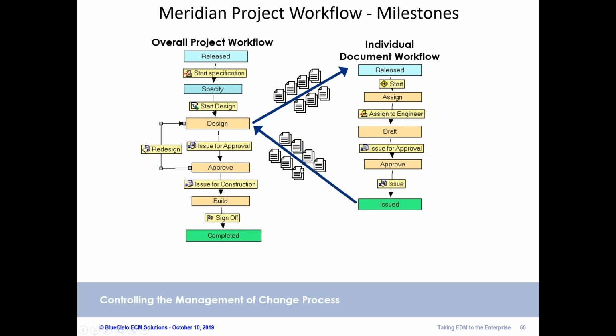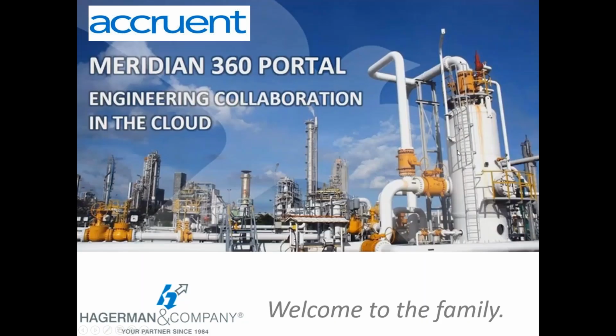And then when all of the individual documents have been reviewed and approved, that whole project package can be issued for approval. And until all of the documents come back, that project workflow would be locked from moving on. Of course, in some cases in large projects, they're done in phases, and Meridian would support that as well.